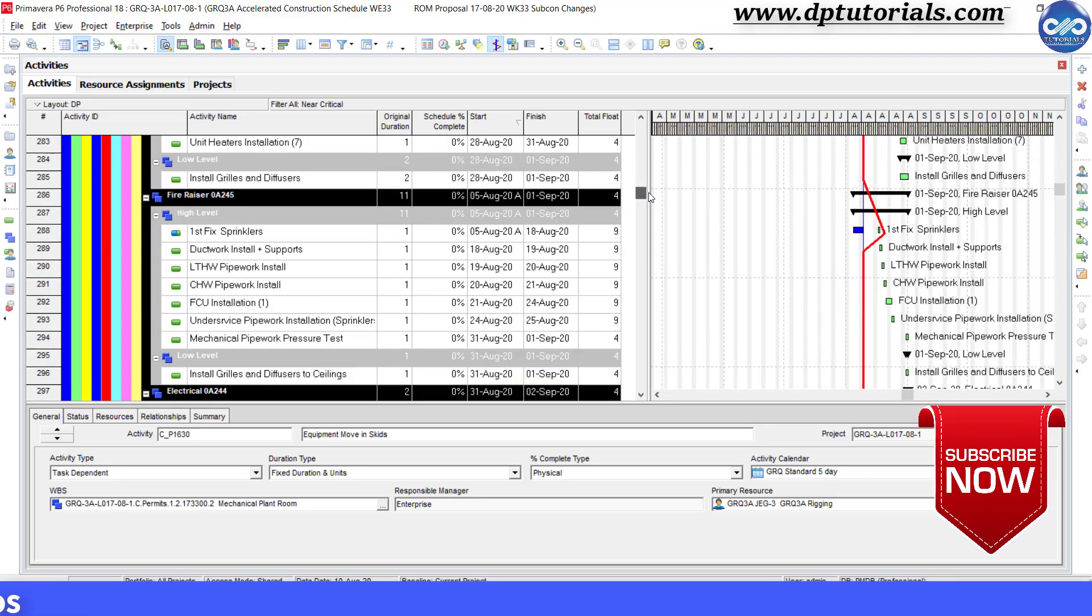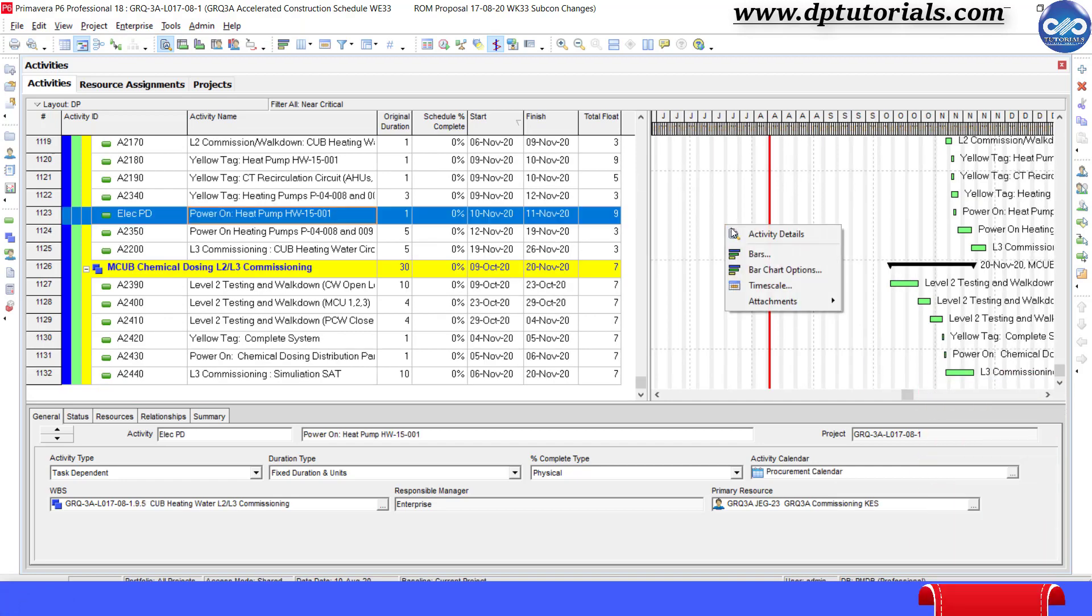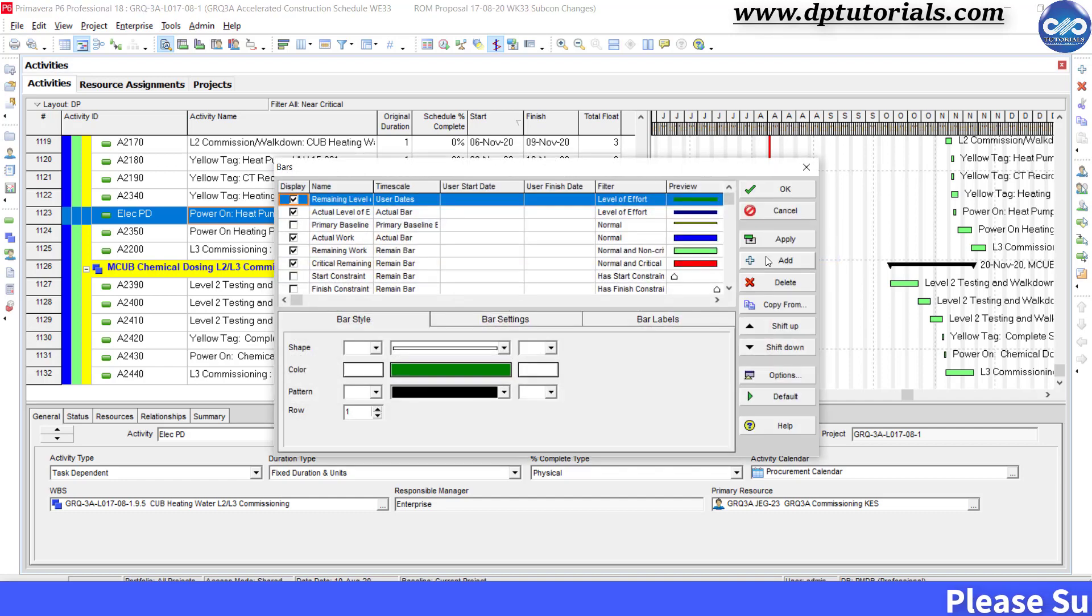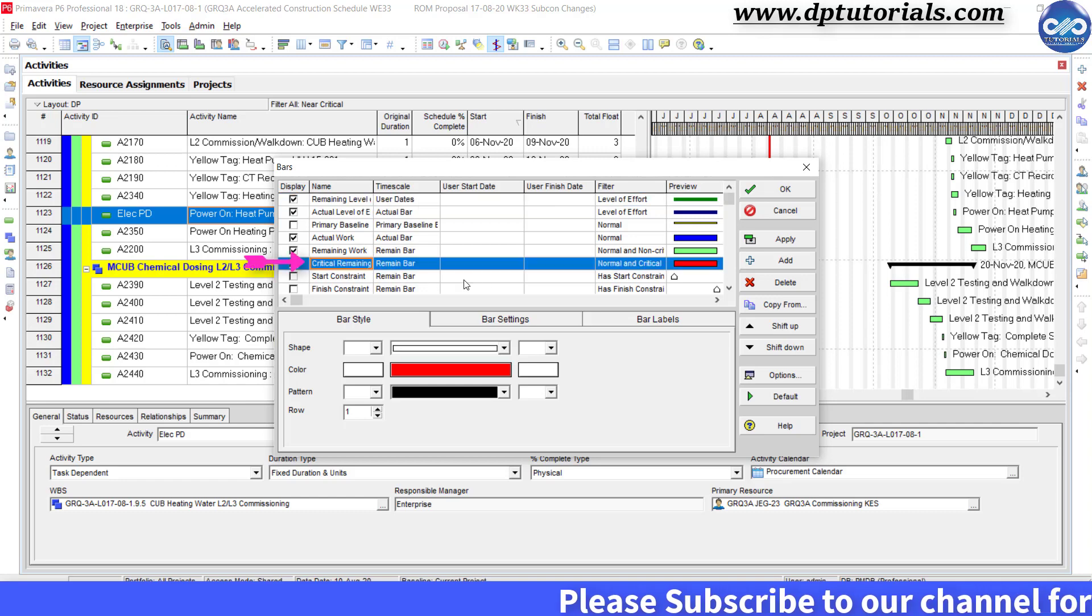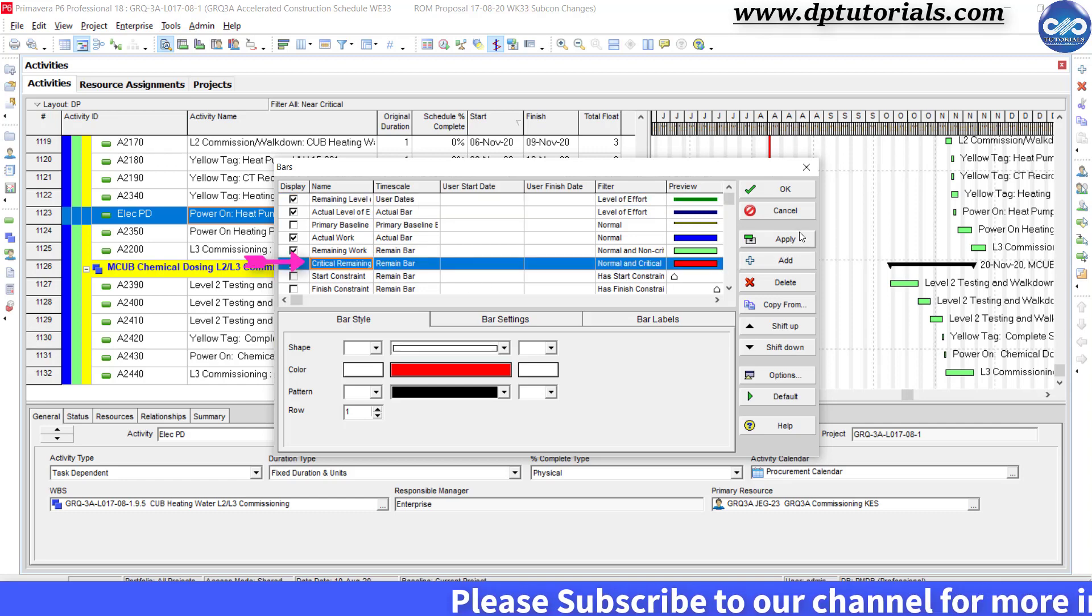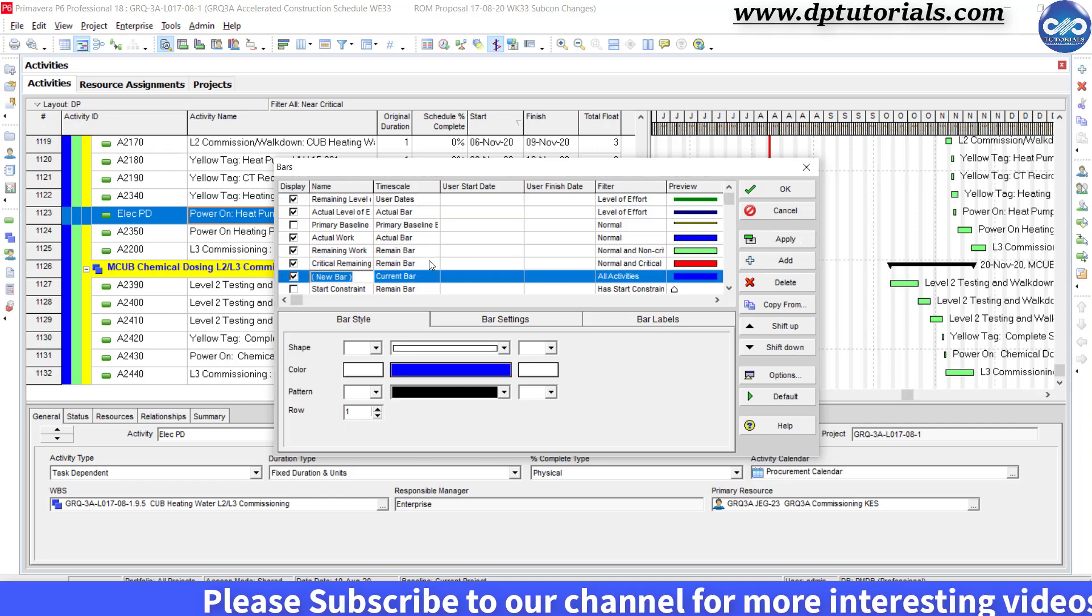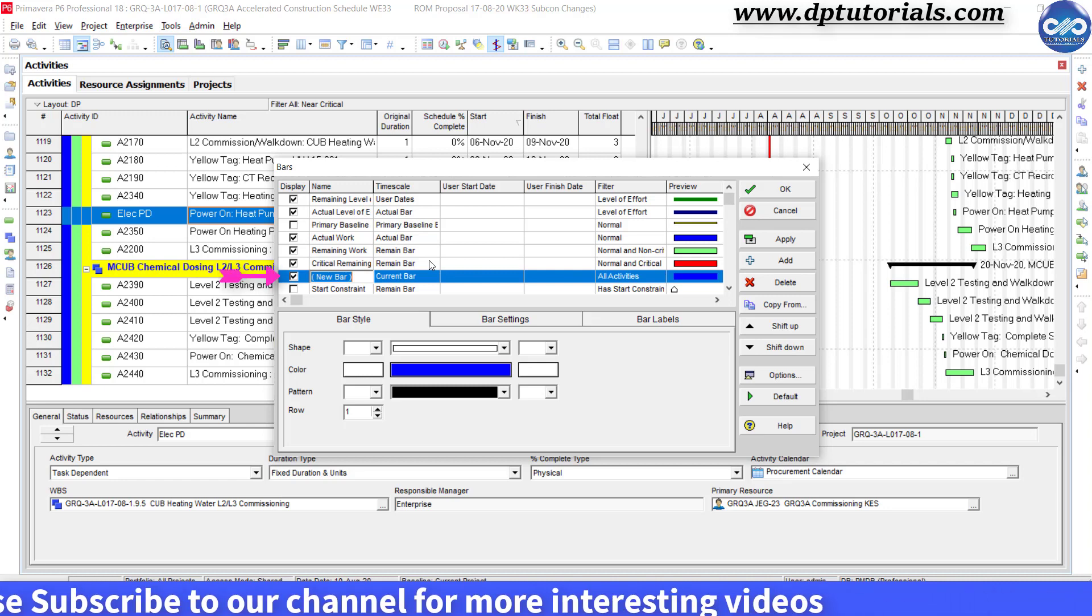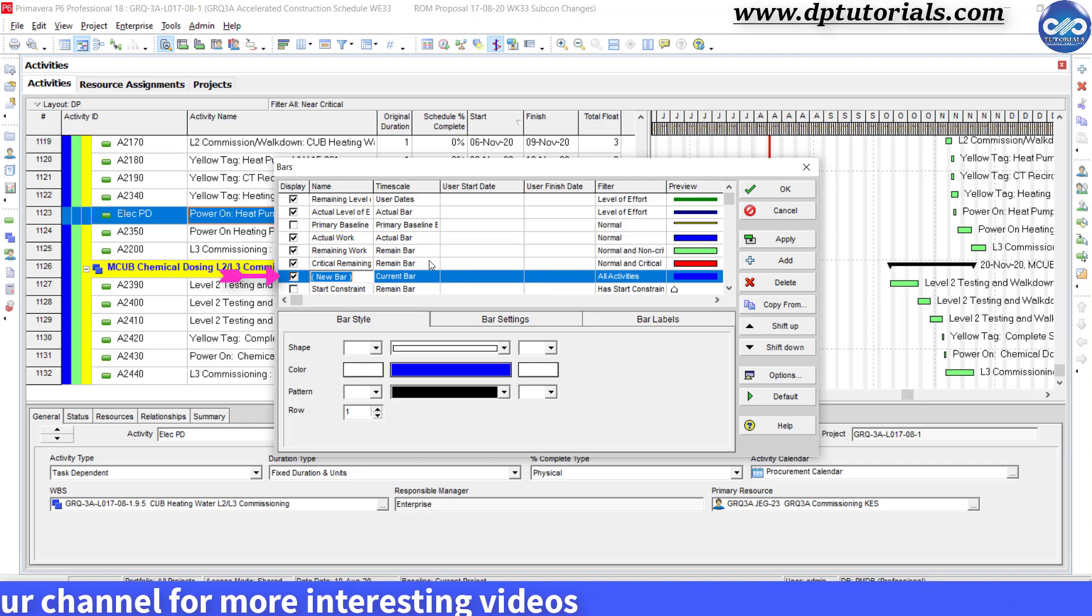Right click in the Gantt chart area to open the bars dialog box. Click on this bars. Now click on critical remaining work bar here and click on add. By doing this we will have the new bar visible just under this selected row.